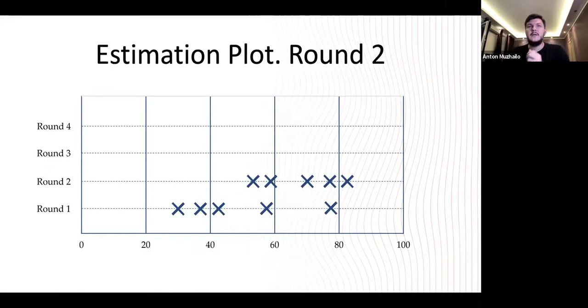Very important to define the good enough shrink range. So in this case, it's still between, I would say, 45 to 82. So from 45 to 82, there is still a large range, I guess, like 35 points, a lot of them. So we still need another round to shrink it. So same round, why do you think it's not the smallest amount and not the highest amount? So people, again, discuss more and more, and eventually we go to round 3, 4, etc., until we get some kind of consensus.